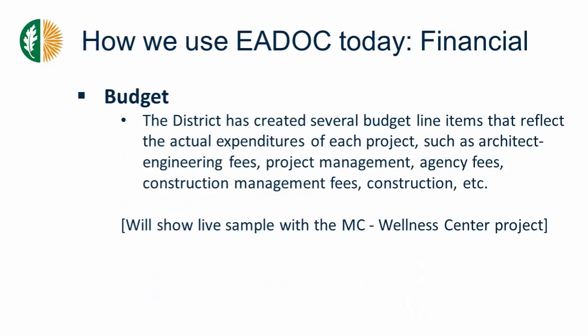Again, in EADOC, we've established budget line items for each one of our projects that actually reflects the actual expenditures, such as architect fees, project management, agency fees, construction management fees. And again, I'll show you a live sample of that in one of our projects, the Wellness Center project. So that's kind of the overview of our PowerPoint. And we're going to go live.